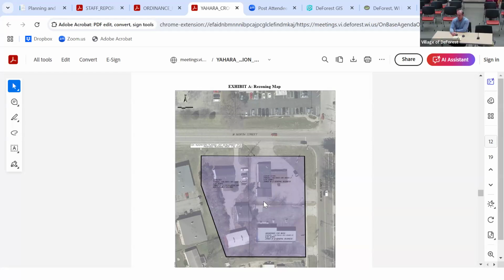I will say that we'll probably still do at the very least a Phase 1 environmental assessment. And obviously, if anything is turned up with that, we'd look at a Phase 2, but we'll still do a Phase 1. Thank you. Anything else, Lisa? Any other commissioners?